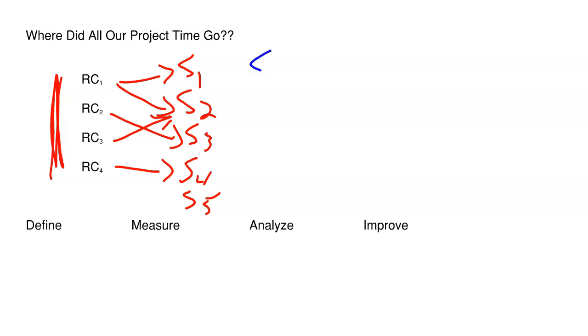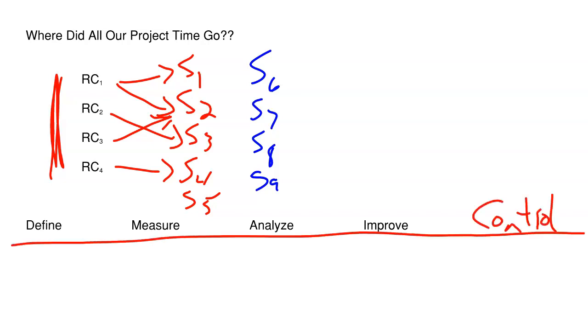to that solution list. The problem, though, is that we've been consuming a lot of time going through all of this data-driven problem solving. If you remember in earlier videos, we talked about how you can time box each phase of the DMAIC and expect a certain amount of time to be used when working through all of these tools and activities. The general rule of thumb that I give for define, measure, analyze, improve, and control, I know we're not yet in control, but I'm going to add it here, is the old 30-30-10-10-10 rule.